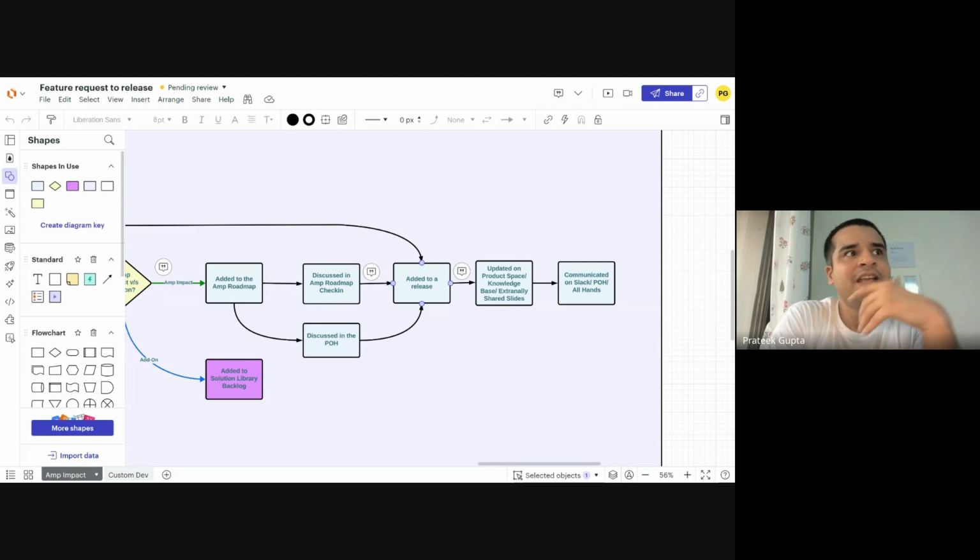A simple example is you have 4 months to build a release. Let's say your top three features take in total 6 months to build. You can't really get all three features in that release. So you'll probably get two of the most valuable features, and then some smaller enhancements, which don't have that much value, but can be fixed in the time that we have left. So you identify how much time you have, how many developers you have, and then identify the things that we can build in this release, which will have the maximum impact for our clients.